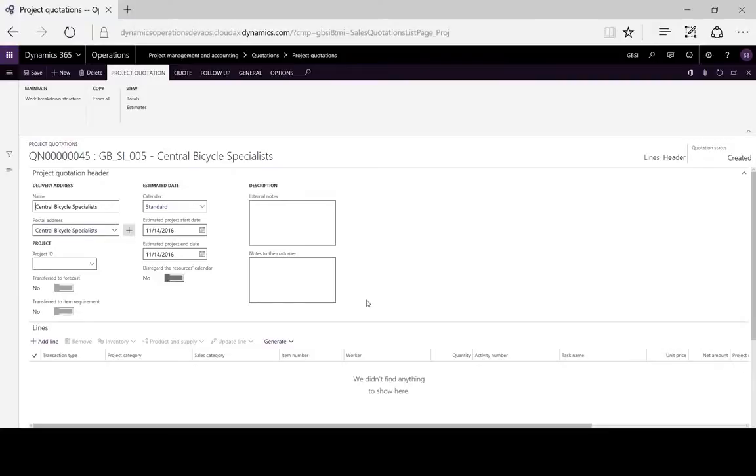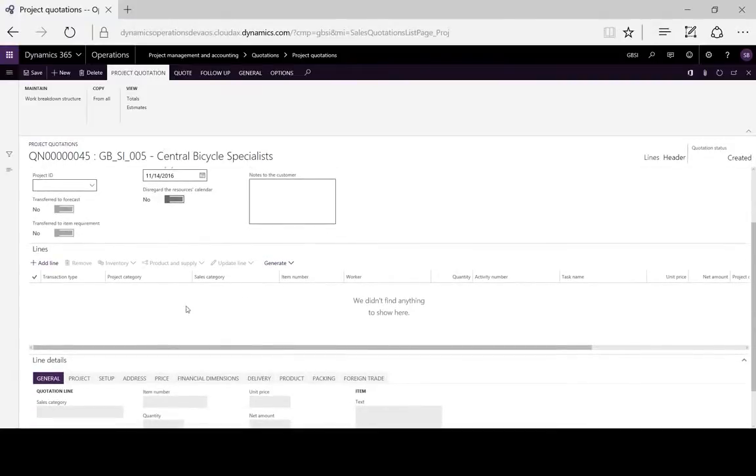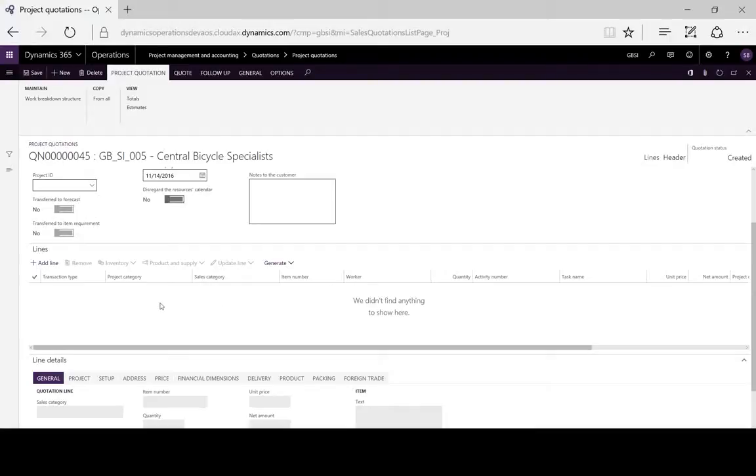We can now create our lines, entering details of the proposed project, timing, duration of the activity, and the resources that are required.